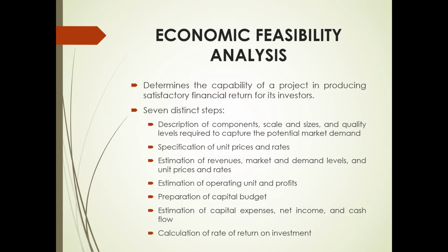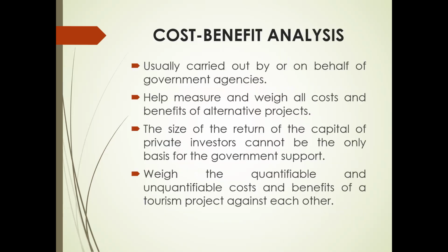Based on the rates of return predicted through the use of one or more of these financial analysis techniques, a decision is reached whether the project under consideration is economically feasible. If the rate is less than the requirement of investors, the project is considered not feasible, and vice versa. So now let's proceed with the cost-benefit analysis.